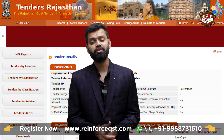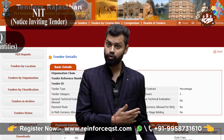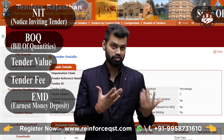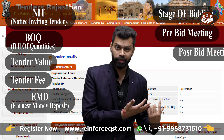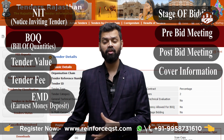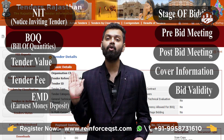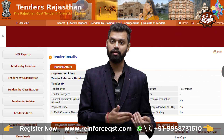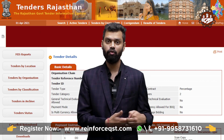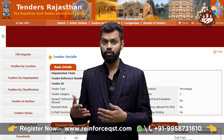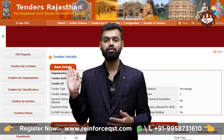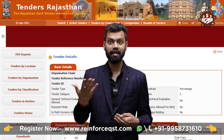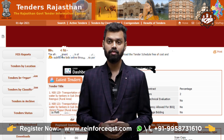The components of the tender comprise: NIT, BOQ, tender value, tender fee, EMD, stage of bidding, pre-bid meeting, post-bid meeting, cover information, and bid validity. These are the important components you should know at the very starting phase of bidding — whenever you operate the online bidding or open your e-procurement website, you will encounter all of these components.